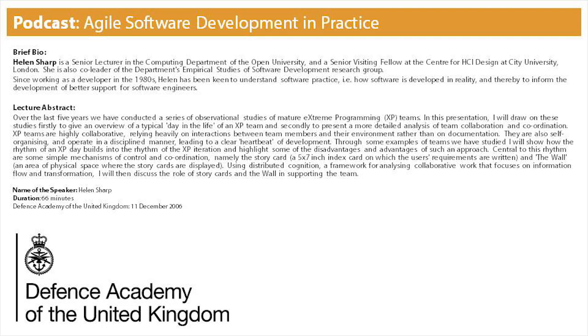Again, this is divided up in very specific ways. In this particular team, they had a slightly more complicated kind of iteration where they'd have one 3-week iteration and then three 1-week iterations within it. If you can just take that on trust, I'm happy to talk about it if you want to know more. Each week then had its own section of the wall, and the cards at the top were to do, and then once they were done, they were moved down to the bottom. And again, this was copied across every iteration that we saw. This is how the wall worked.